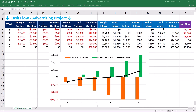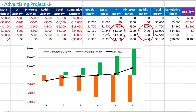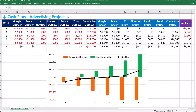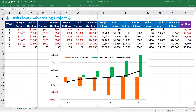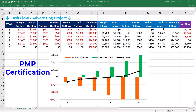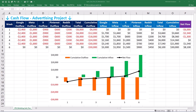Reddit and X show a long-tail effect where a significant portion of conversions occur after campaigns end. Reddit generates 30% of its total inflow — $450 out of $1,500 — in week 6, and X earns 33% of its revenue post-campaign. These delayed inflows effectively act as free profit since they require no additional ad spend. By visualizing the cash flows, we have created a decision-making tool — an important concept in the PMP certification exams by PMI. Cash flow analysis allows project managers to plan for potential delays and ensure sufficient liquidity to cover early negative cash flows.